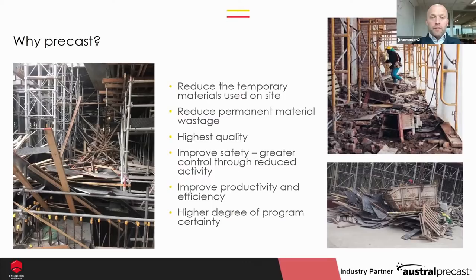Improve productivity and efficiency. So when we build concrete structures, we tend to use cranes, usually tower cranes. You know, tower cranes can only do 50, 60, 80, 100 lifts a day. The question is, to make the industry better, how do we get more out of every time a crane swings or lifts? So it's a big driver to improve that productivity. And last of all, if we get improvements in productivity and efficiency, the chances are we're going to get a high degree of program certainty.